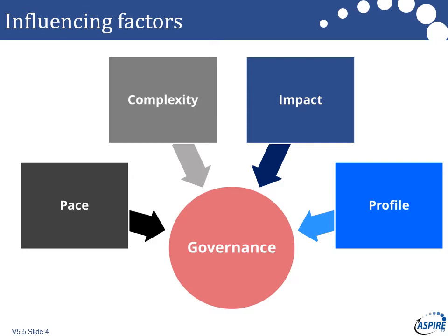So complexity is important. Impact, we're thinking about the wide scale effect on the way the business operations are working. The more the impact, the slower it will need to move. We need to remember this stuff, and there are more people that we need to have in. So if it's hitting a lot of business areas, they all need to be on board as business change managers. If we're going down high complexity in terms of technology or process change, we need to make sure we've got that expertise on board.